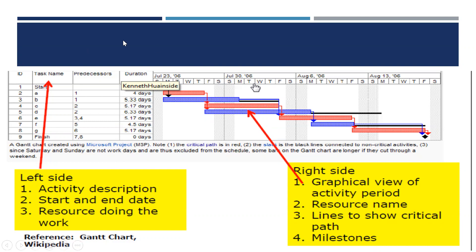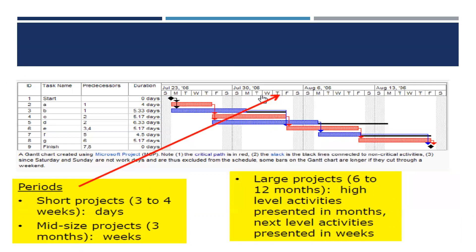There is software available for Gantt charts, but we can also use Excel, which is resourceful enough. You can still capture milestones, activities, and the like. The time period can be in days, weeks, months, or even years. Large projects use months for high-level activities, and weeks for next-level activities. Some activities may even be tracked in days.